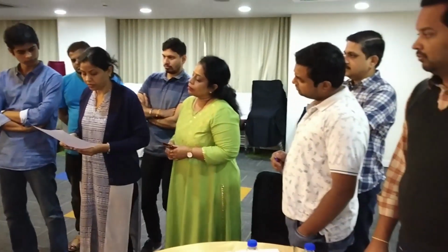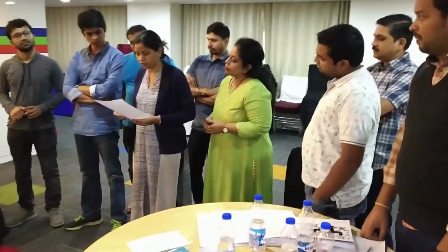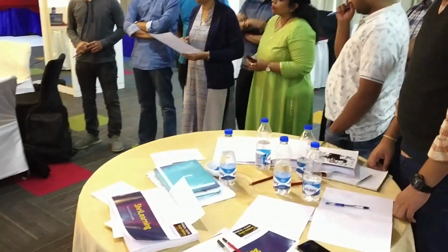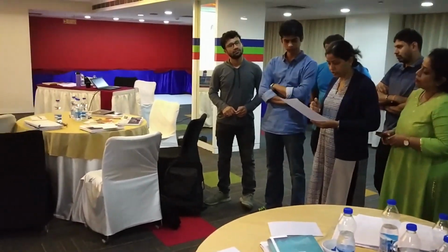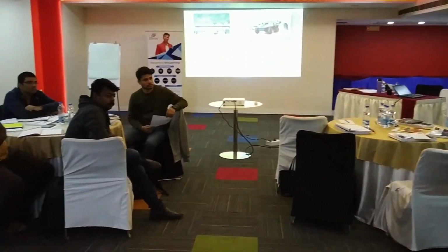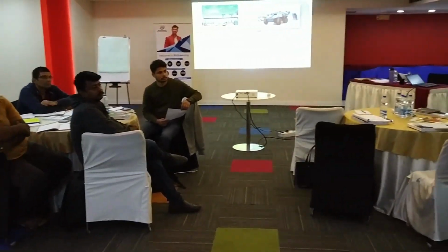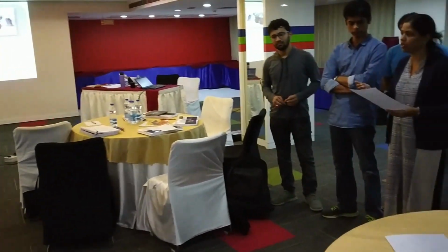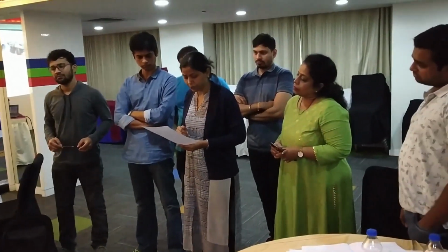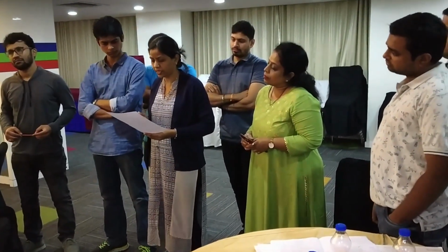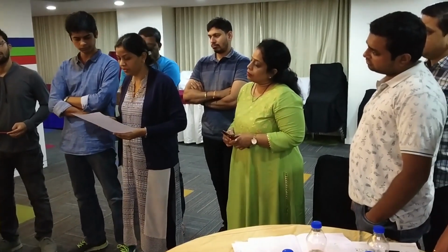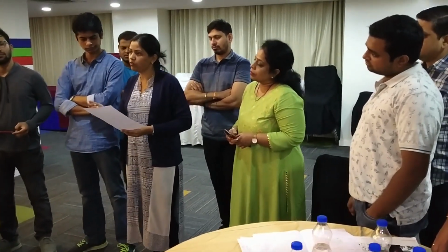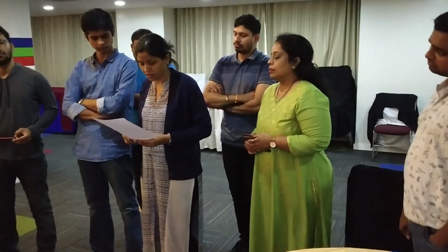Going to 3-point estimation, we have taken into consideration the work breakdown structure of the project. The schedule as per the beta distribution gave us a slightly refined estimate of 55.5 days, which is very close to what we estimated with the initial two formulas. With respect to cost, again with the beta distribution, we got 1.55 million, which is again very close to what we estimated in the initial two phases.